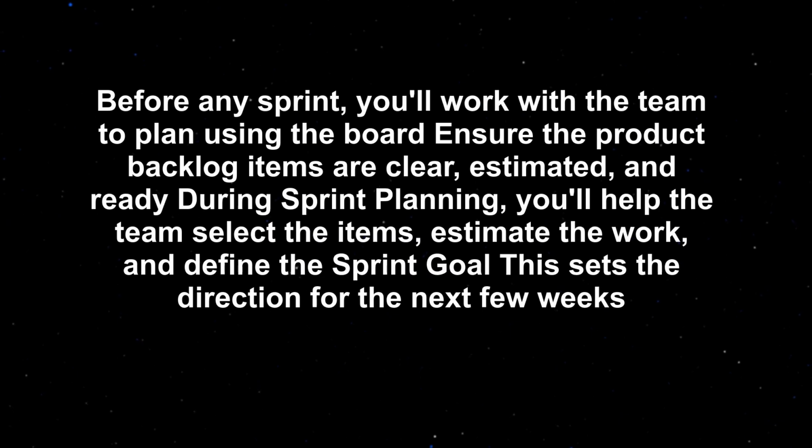Before any sprint, you'll work with the team to plan using the board, ensuring the product backlog items are clear, estimated, and ready. During sprint planning, you'll help the team select the items, estimate the work, and define the sprint goal. This sets the direction for the next few weeks.